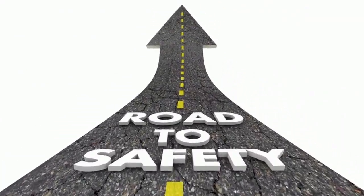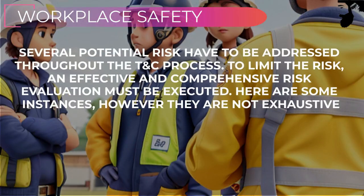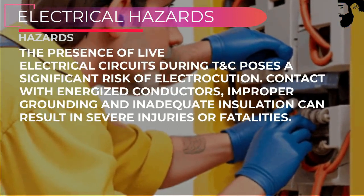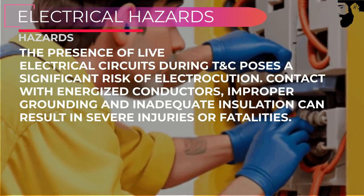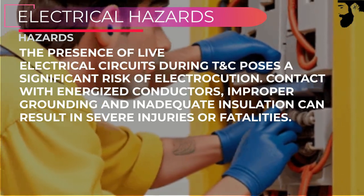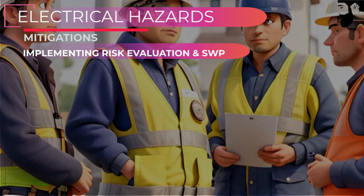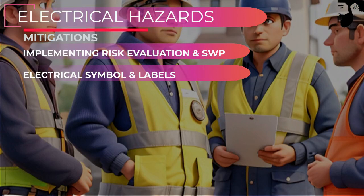Next, workplace safety. Several potential risks have to be addressed throughout testing and commissioning processes. To limit the risk, an effective and comprehensive risk evaluation must be executed. First and foremost, electrical hazards. The presence of live electrical circuits during testing and commissioning poses a significant risk of electric shock and electrocution. Contact with energized conductors, improper grounding, and inadequate insulation can result in severe injuries or fatalities. Implementing risk evaluation and safe work procedures to manage hazards, as well as understanding common electrical symbols and labels, are some of the control risk reduction techniques.